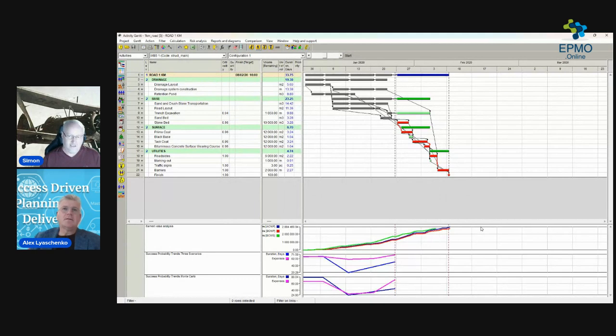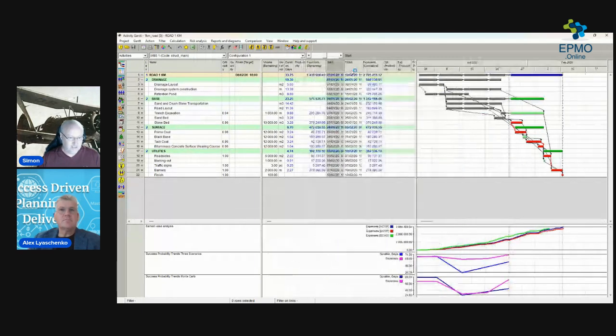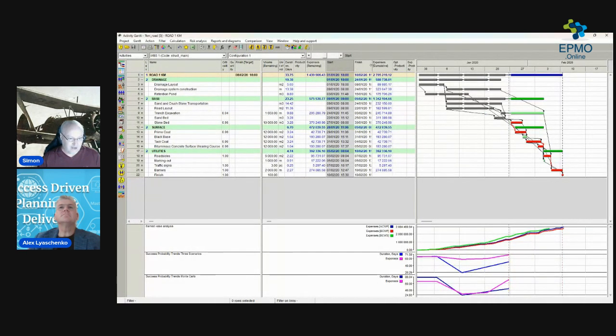So I can appreciate that a lot, because normally with a project, you take it out as a separate run sheet and hand that to the resource. The task might be software release, X date, X hour, but then you've got to take it more granular via a run sheet for the individual items, because you would probably clutter the project otherwise. But that's good. I like that. It's very specific. Of course, not each project needs that, and not many at all. But if needed, they have that.